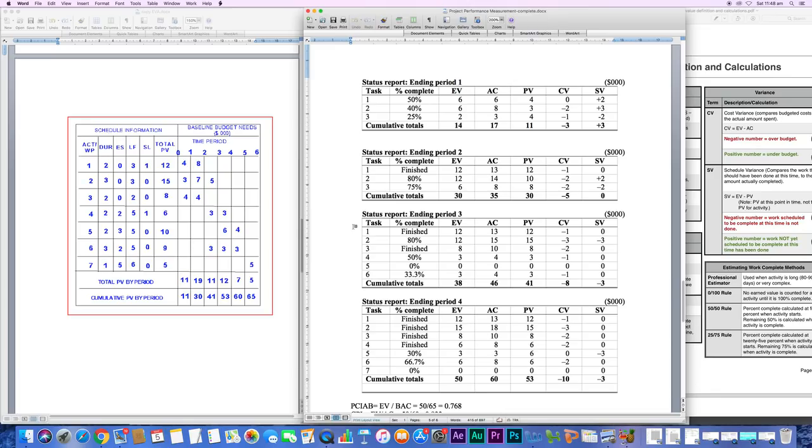You will be doing it period by period in real life, because you are at a certain point of time in your project, so you are only doing where you are at, because all completed activities will have variances 0 or performance indexes 1, so they won't be painting a real picture to you. Okay, but this is just an example for your practice.